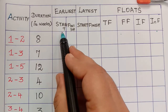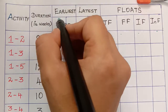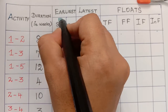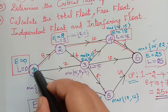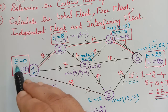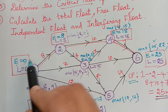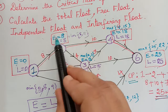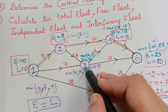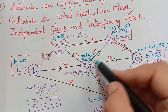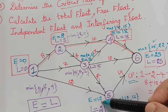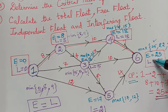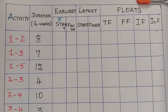We have already drawn the network diagram and found the critical path, with a project duration of 25 weeks. The earliest start values come from the E values calculated in the network diagram: event 1 has E = 0, event 2 has E = 8, event 3 has E = 12, event 4 has E = 18, event 5 has E = 17, and event 6 has E = 25.